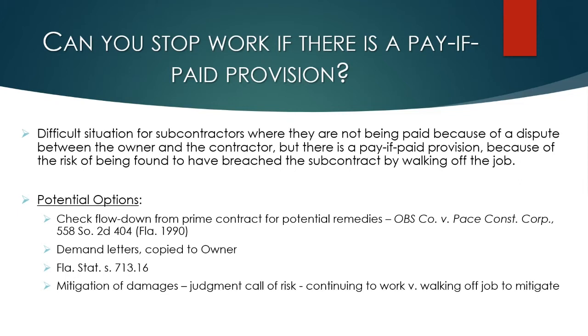Another thing that you might be able to do is send a demand letter to the contractor demanding payment, identifying that nobody's identified anything wrong with your work and there's no reason for you not to be paid, and potentially copy that to the owner. And if you're going to potentially threaten to walk off the job, copy that to the owner so the owner knows that, hey, not paying these subs is going to have a very serious effect on the project. And maybe that brings the owner to the table with the contractor sooner to get some money flowing. That recently happened in a case that we're representing a paving subcontractor on, where we sent that type of letter, and lo and behold, money started flowing.